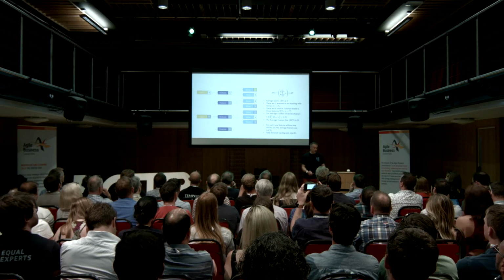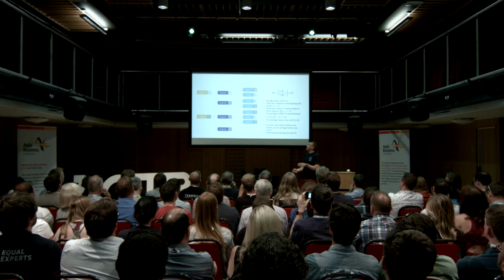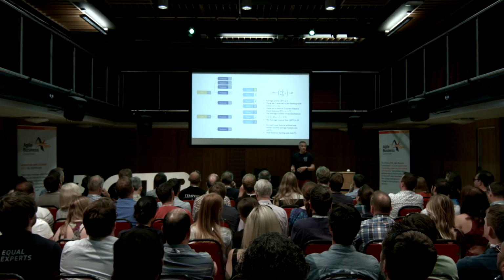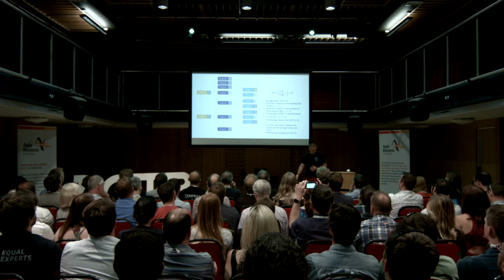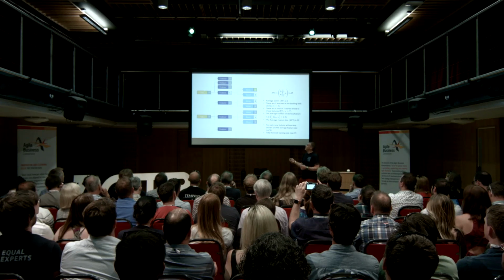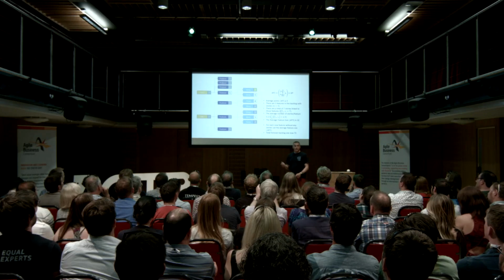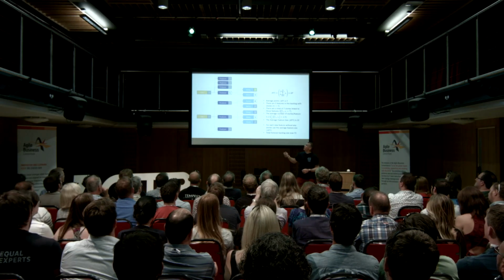This is a starting point. And we can do this again, so we look at this top epic and suddenly realise there are some more features, so we can put those in, and we can say they're all 10, so we can now say our backlog's gone up to 73. Now, in reality, it's unlikely that we would add 3 features to an epic which has already been broken down into a feature and some stories. This is probably more likely to be an entire epic.